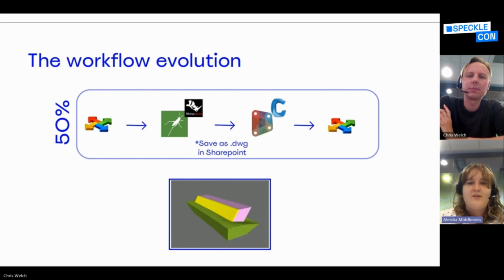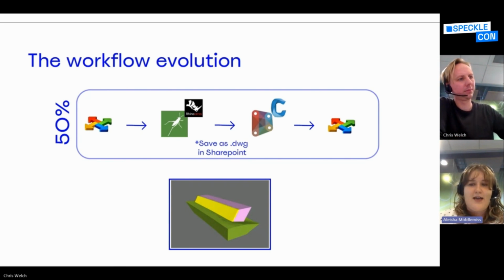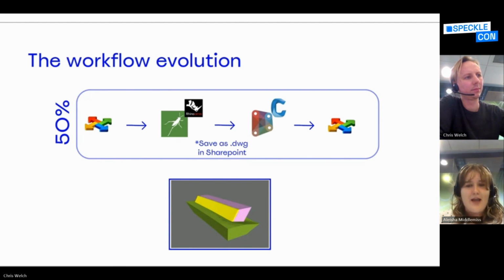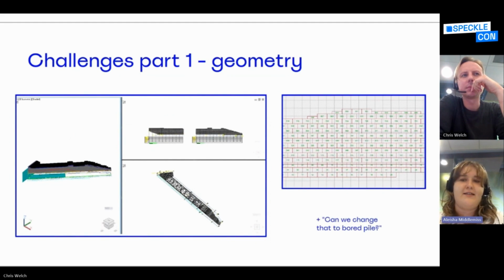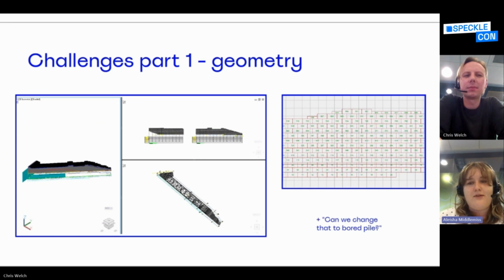From the foundation of this 50% design workflow, we began to build a more complicated but more robust workflow able to handle the complexities and detailed design stages. We found two main challenges. Firstly, we needed to consider that the designs will change and that the level of detail would increase, requiring additional workflow complexity. At the beginning, we were generating geometry that was not too complex and only passing minimal geometry through multiple pieces of software. As the geometry and outputs became more complex, our method of exporting out of Rhino and importing manually into Civil 3D became less feasible and harder to manage.